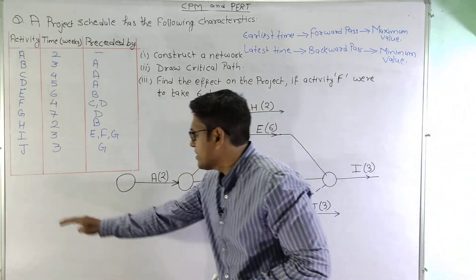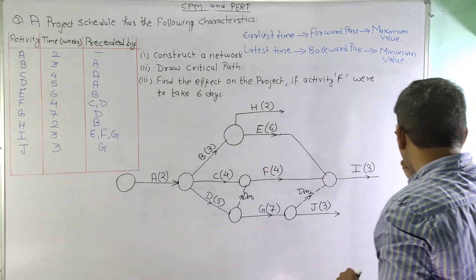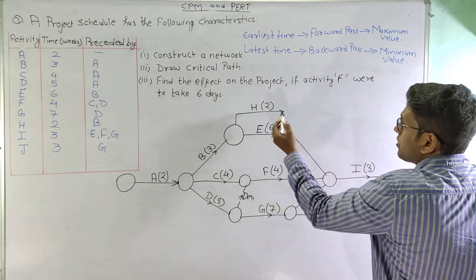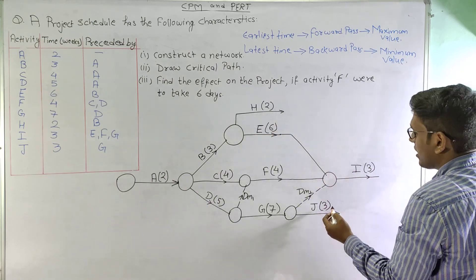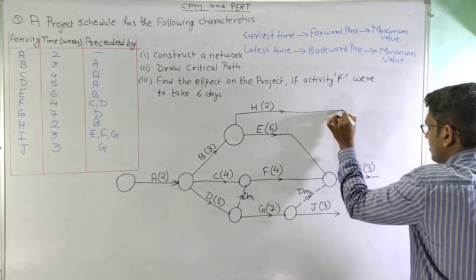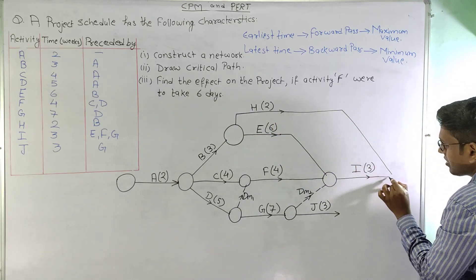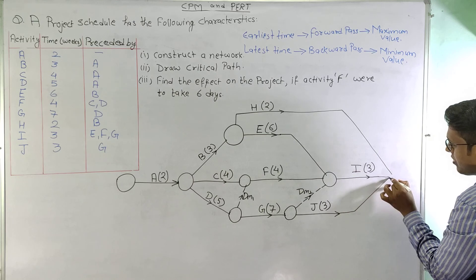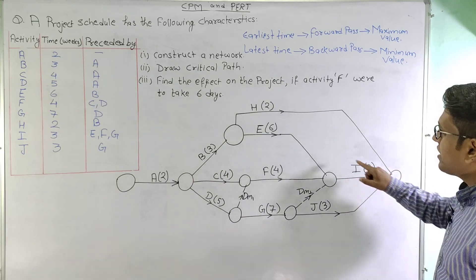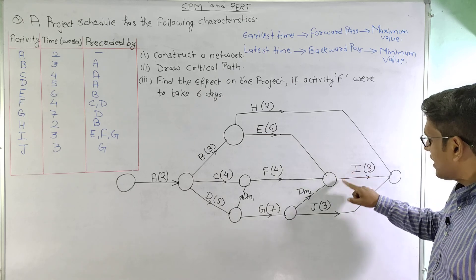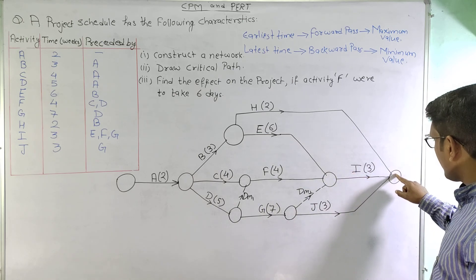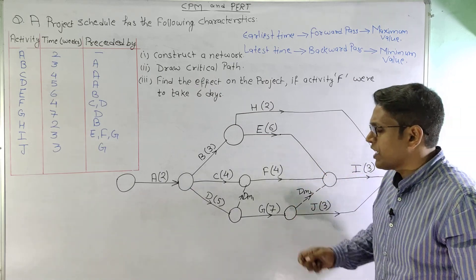Now that all activities are placed, we check which activities are still open: H, I, and J are open. So we converge H, I, and J to a single finishing node. This completes our network diagram.